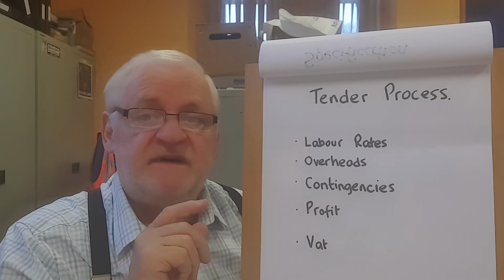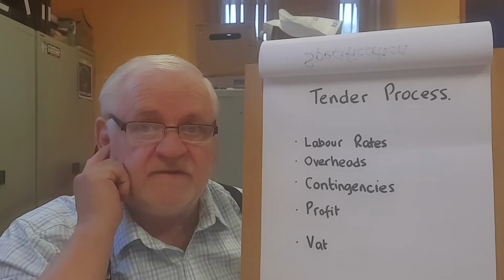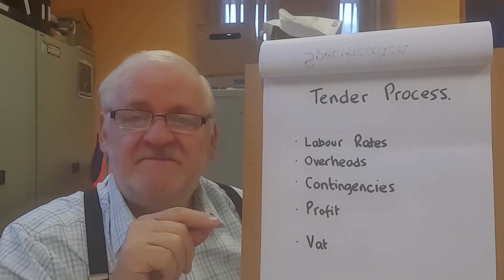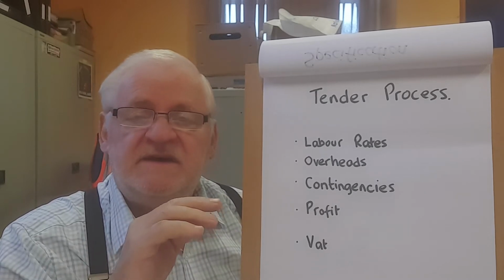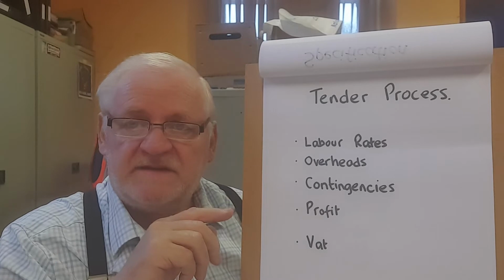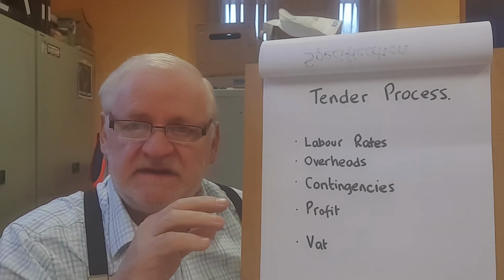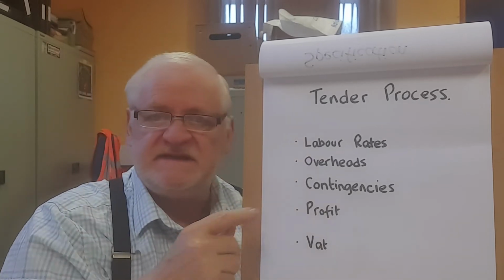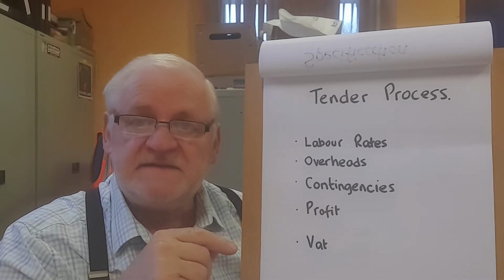And sometimes that's very expensive. Sometimes it's the responsibility of the water board to fix any pipes that break. But sometimes the water board will say, no, this is going to cost £100,000. We need the contractor to pay for it out of his insurance. And so there's sometimes disputes in building work about contingencies. But contingencies need to be taken into account in a building, and they can be expensive.